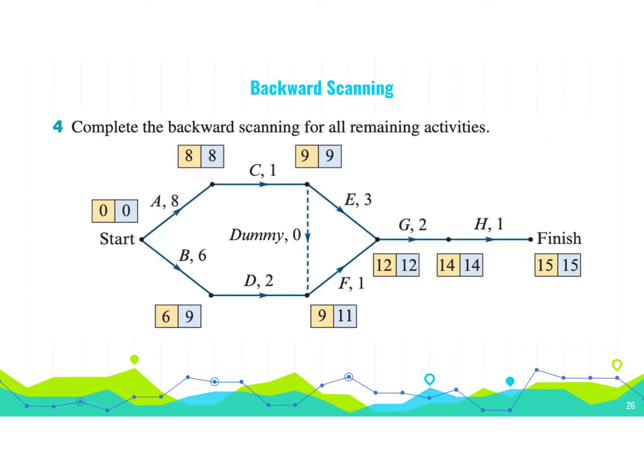Okay, so once they're all going to equal each other, that will become our critical path with no float time. But what about the ones down here? So the activity F could start at 10, all right, and it would still be finished by 12. Or it could start at 11 hours and still be finished by 12. So this is its latest